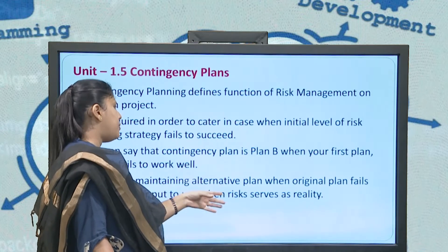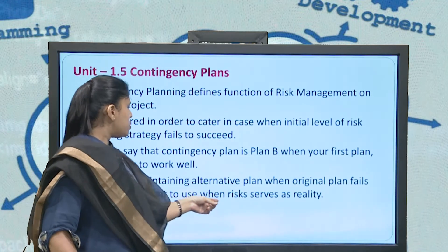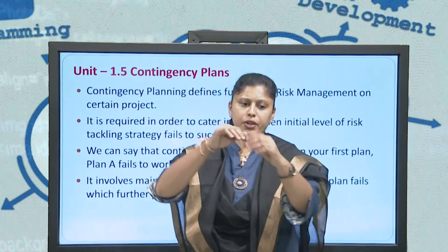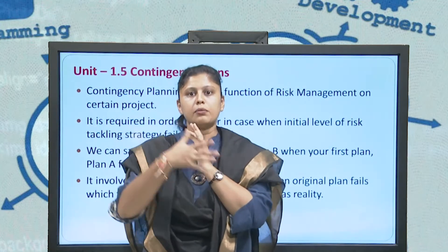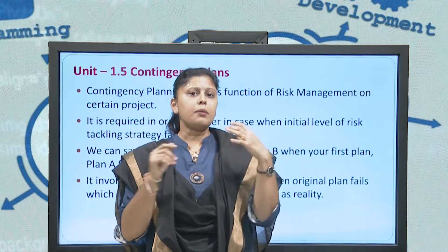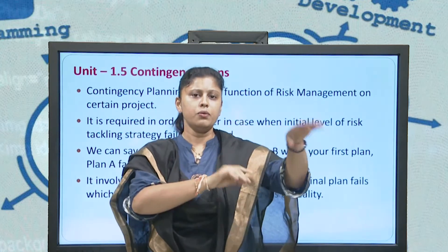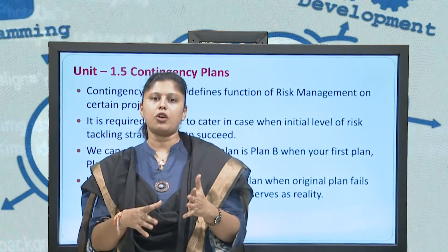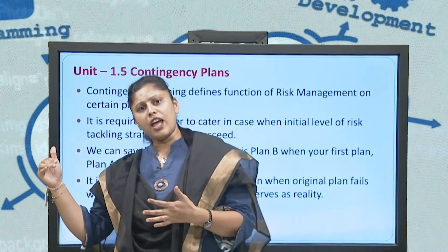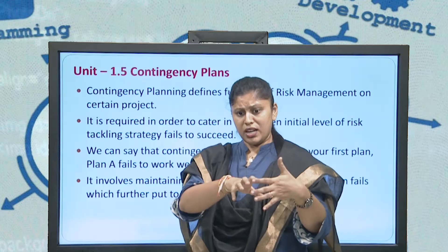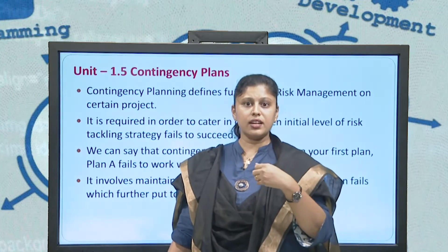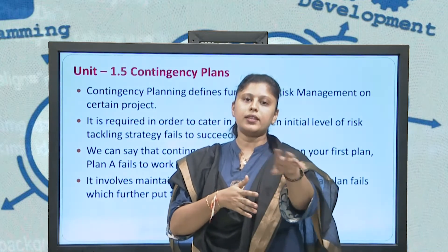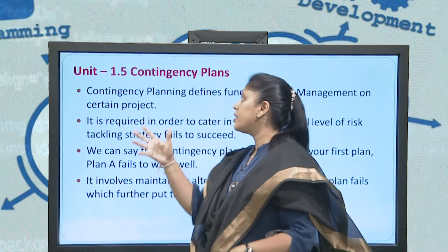A contingency plan involves maintaining an alternative plan when the original plan fails, which is put to use when risk becomes reality. For example, if you are traveling from Rajkot to Ahmedabad via Chotila and Limbri — plan A — but that route is under construction, you take an alternate route via Surendranagar instead. When plan A fails, you use the alternate route to avoid that risk — that is plan B, the contingency plan.